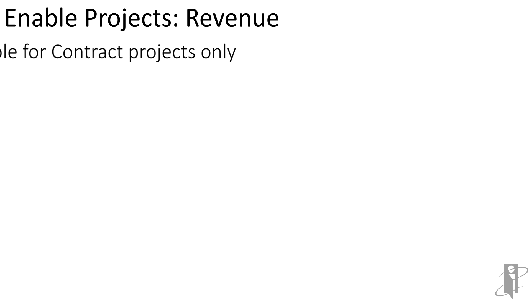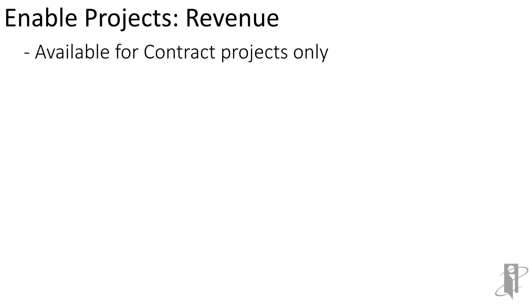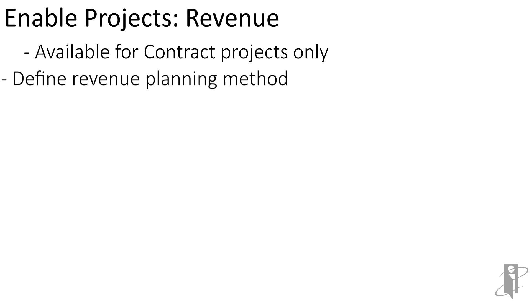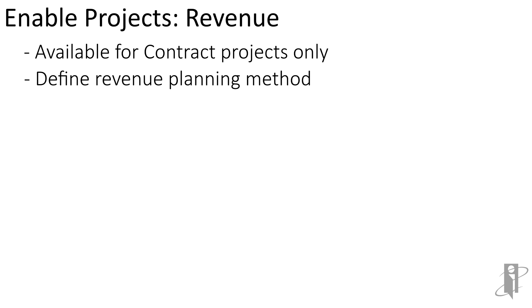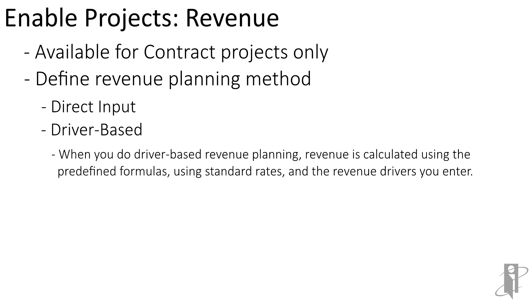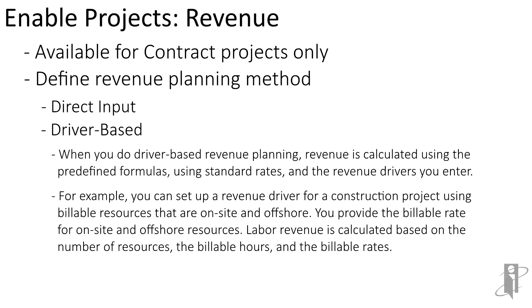Revenue only turns on for contract-specific projects. There are two different types you could do: direct input, meaning you're typing in a dollar amount, or driver-based. A driver might be how much labor you're putting into it, maybe a percentage done on-site, a percentage done offshore, number of people, billable hours, or billable rate. You can put all that in and enable it through the Projects Revenue portion.